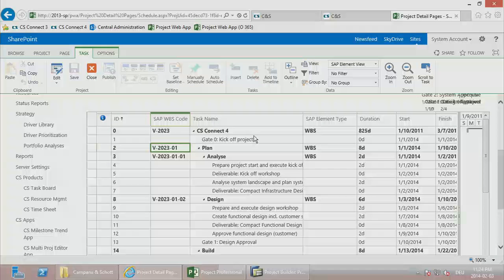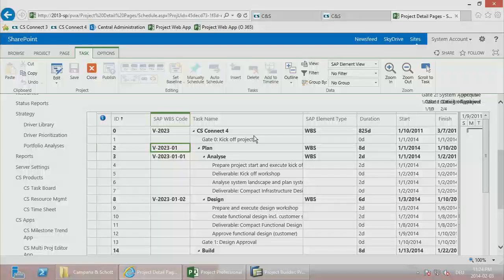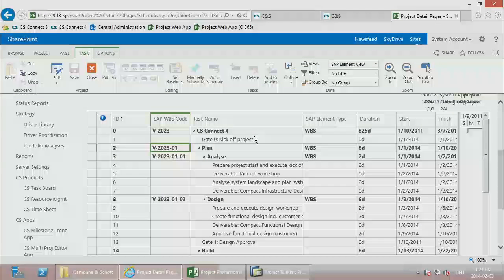So I think the question is, how do we manage if you want to bring in material costs? I think it's purchase order data from the procurement and manufacturing side. I think in SAP it's the MM modules. We did that for a customer, I think it was the French NASA, who has huge projects, but they don't build anything. They just buy the satellites and the rockets, and they get money from the French government to do those things. So for them, those things are key. What we do in that scenario is each purchase order is a milestone for them, and it has some custom fields associated that show the purchase order number, the cost, and the delivery date. If there are multiple lines, it can be multiple elements in the project. That's one way that works for them.